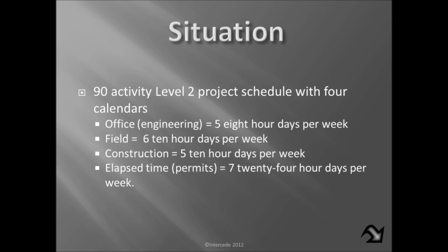And they seem to think that they're going to be working through Saturdays, and basically the hours were going to be about 10-hour days. Construction was 5 days, 10-hour days, and then we just had the elapsed time for procurement. And this is just the 24/7. It just means that 6 months from now, this is when we're going to get something. And it was just easier to think that. So this is the situation. Now I'll show you what I did.